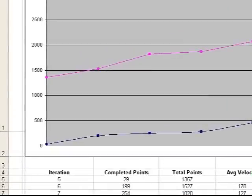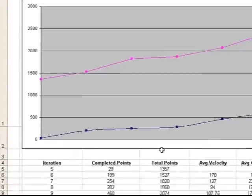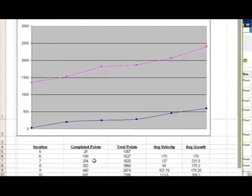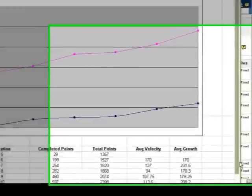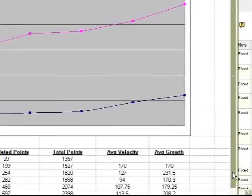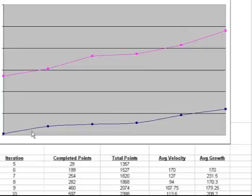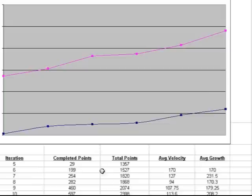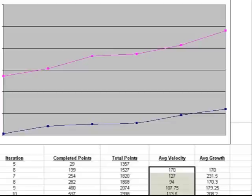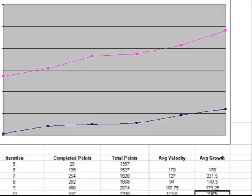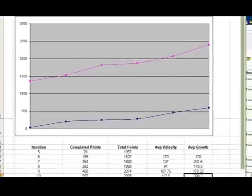You know, anyone with any ambition and any skill set in computers whatsoever could do it and lickety-split, no problem. So right here I have my Excel. So like I said, I'm lazy. I just exported it onto Excel, looked at the sum at the bottom, and then started putting in the points right here. So what you can see right here is this is the same burn up chart that you saw on my dashboard, only now it has the point variable within it. So I'm trending up right here, and you can see then my trend line down here. And then I do some extra calculations here as well, figuring out what the average velocity per iteration is and the average growth.